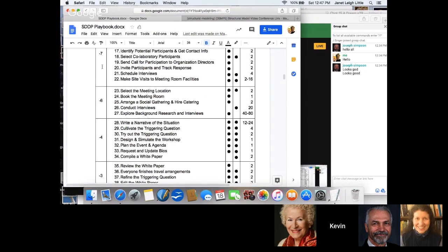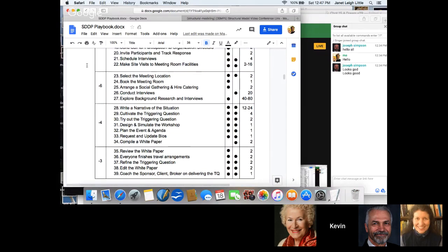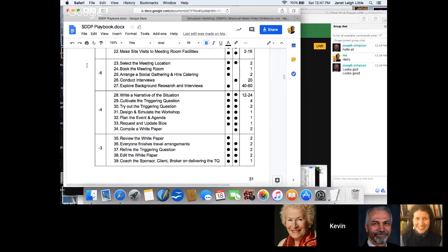Sending the invitation is not drafting the letter and emailing it. It's a seduction, or a matter of honor to them. And the facilitation team's not often in position to do it. But now a lot of events that are political, democracy things, nonprofit things, they want the facilitation team to do that, and it needs to be priced into the contract, because a lot of them are used to doing invitations where they just send out a blast of 1,000 invitations and they hope they get 30 people.